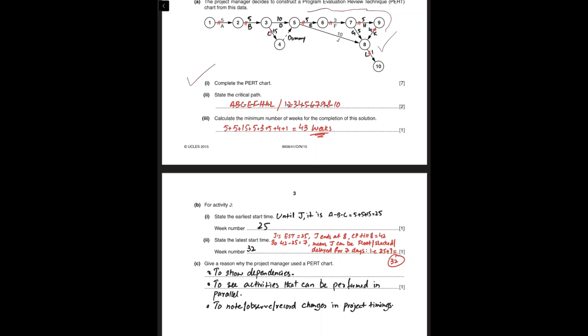For the same from node 5 to 8 on the critical path, it is 17 weeks, whereas the J from 5 to 8 just required 10 weeks. So we can float J by 7 days. So critical path from node 5 to 8 is having 17 weeks, whereas J is having 10 weeks to complete.